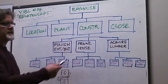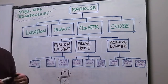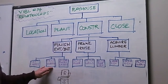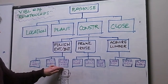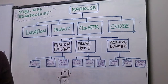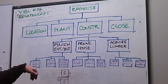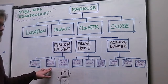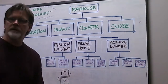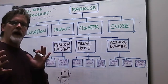Looking at our playhouse example, let's take the exterior and interior finish work package. We have the need to lay carpet within the playhouse, to paint the exterior and interior, and to install the doors and windows. What would be a start-to-start relationship — more of a soft logic rather than hard logic? Conceivably, we could start painting the exterior on one end of the playhouse while beginning to install the doors and windows on the other end — two activities occurring at the same time on opposite ends of the structure.